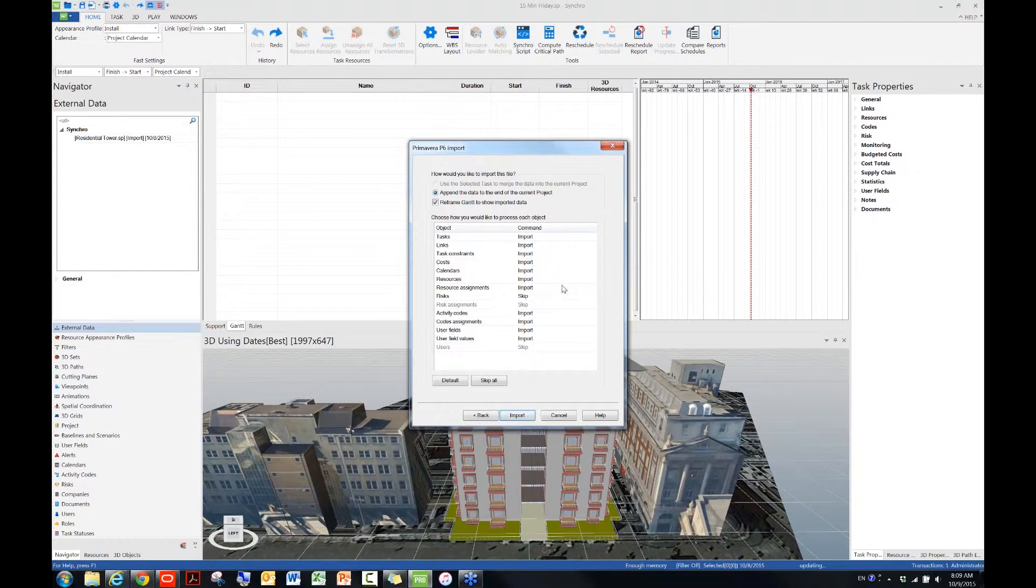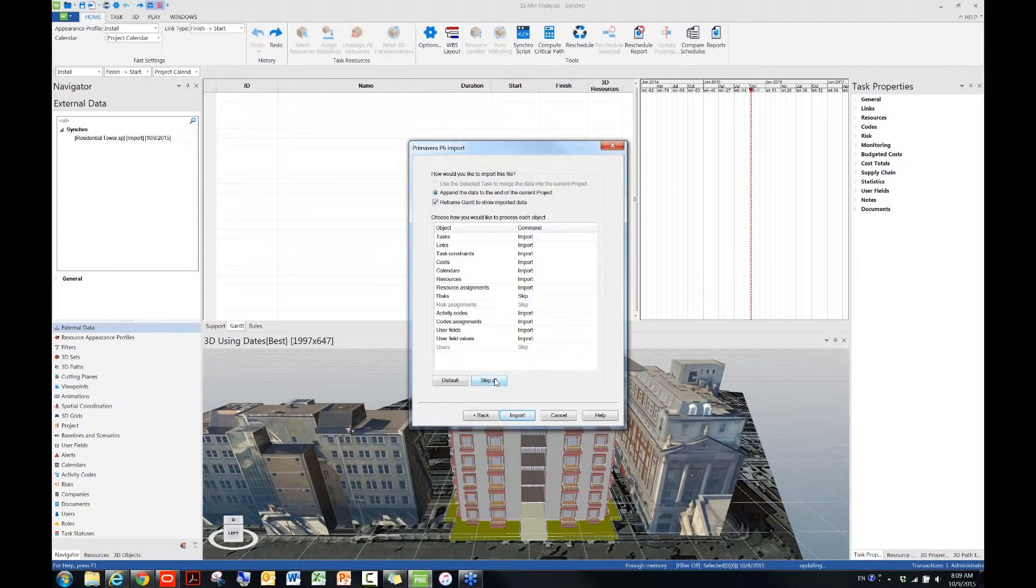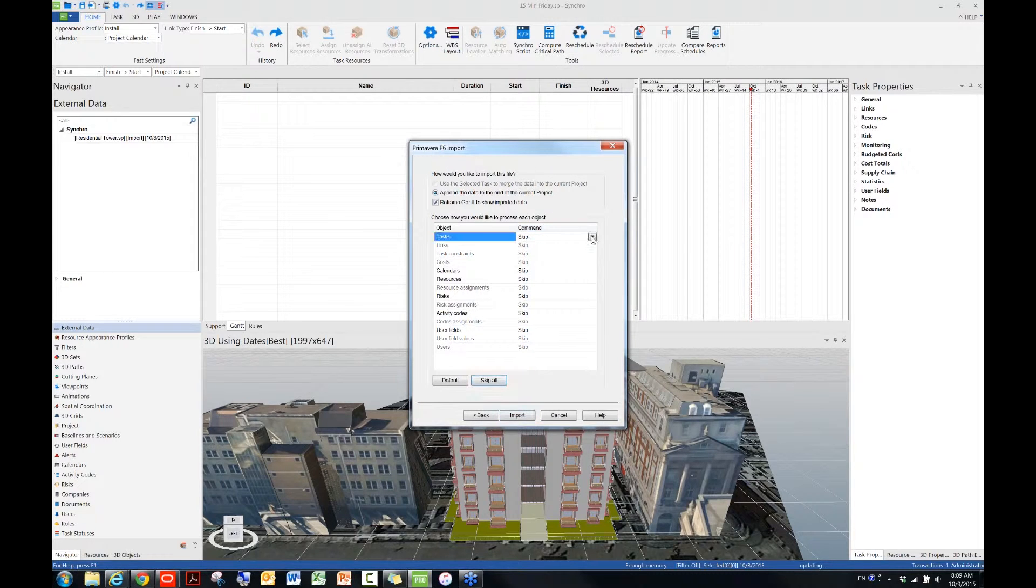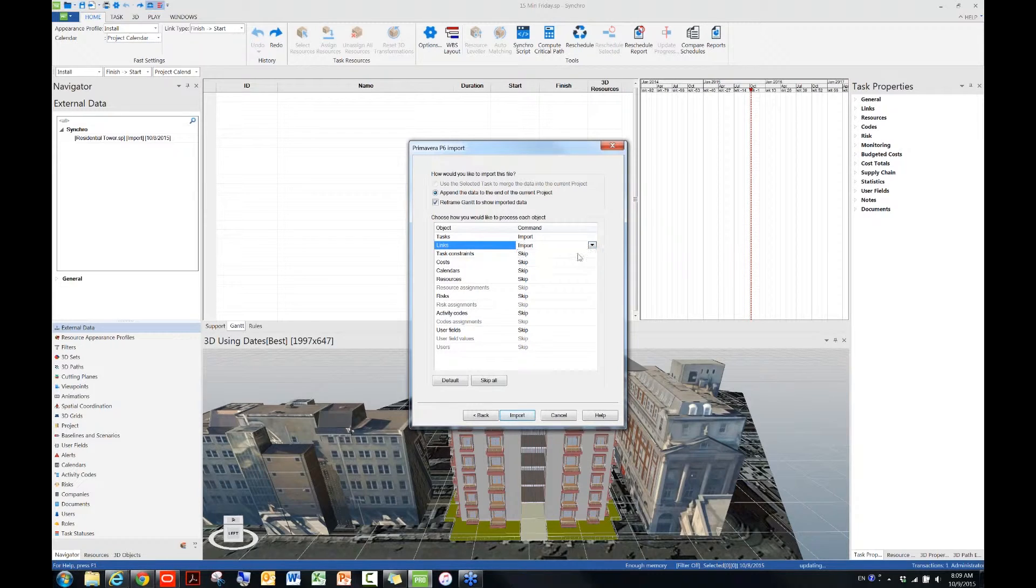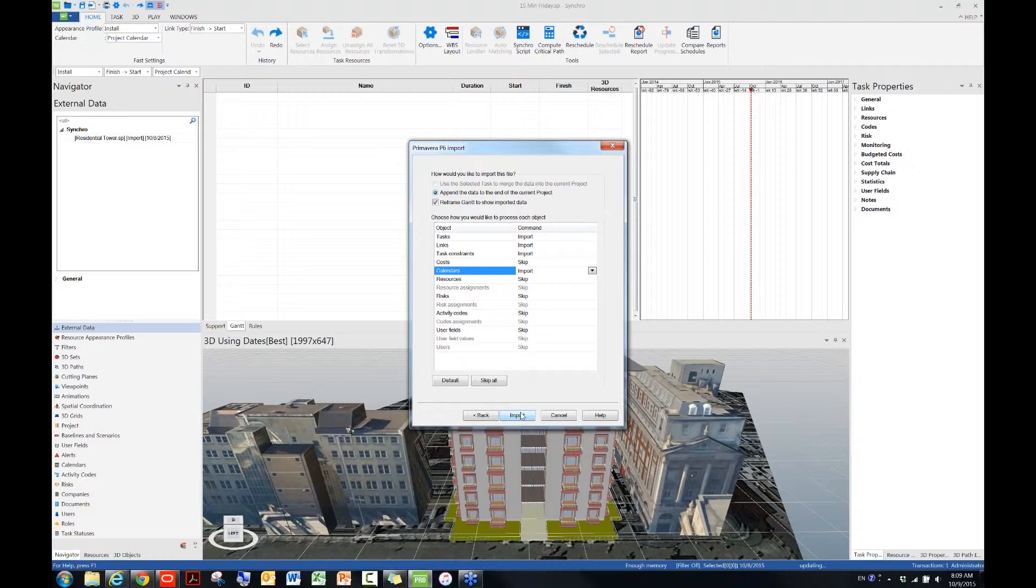And I can click on next. Right now, let's assume I'm already very experienced with the import process, and then I only want to probably bring in three or four types of objects into Synchro. So let's assume that I'll just skip all first, and then I want to bring only tasks, links, task constraints, calendars into Synchro. These are probably the most important things for a scheduler. And then once it's done, I'll hit import.